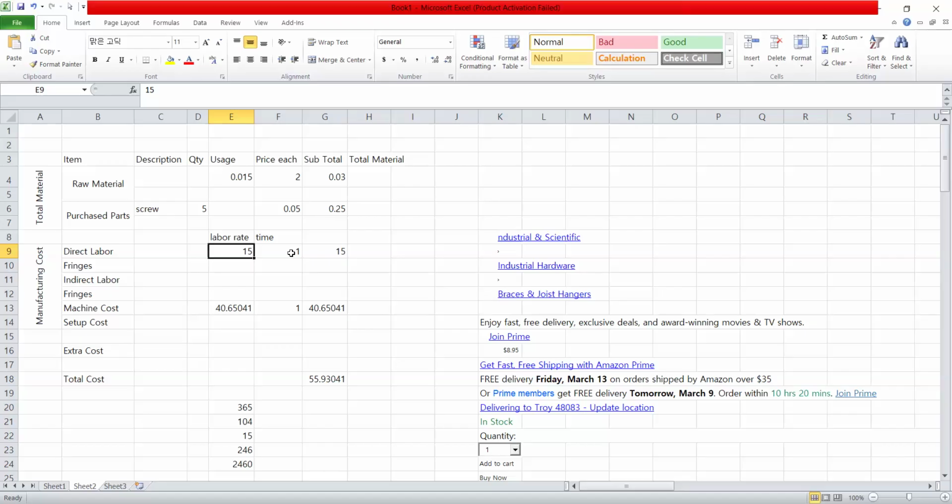So when we visit the supplier, we keep our phone with us, and we start the stopwatch, and we calculate how long it takes to manufacture that part. So let's say in this case, this is based on one worker. If I have to put a number of workers, sometimes for one machine you have to put two workers. In that case, this time will be multiplied by 2. But in this case, I have assumed only one worker and 1 hour.